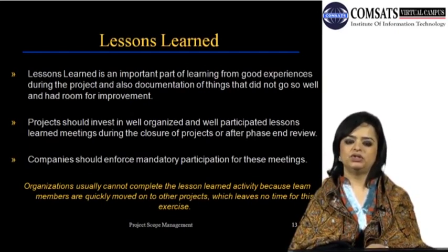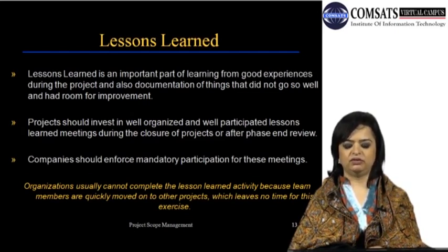But what's the benefit to the team if it is always done at the closure phase? So in large projects, lessons learned meetings should be done in the midlife of the project or at the end of every phase to learn from mistakes and to actually reap the benefits during the life of the project.